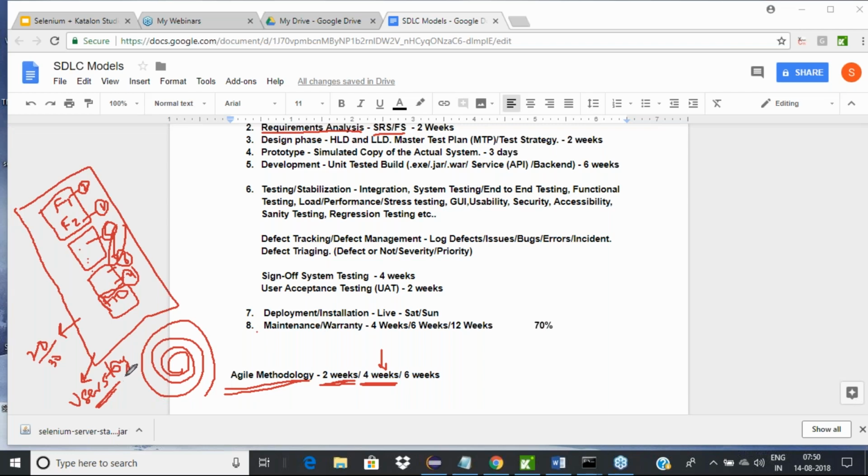And in Agile, everything happens through user stories. And typically there is a Scrum team of 7 members. Like there is a question Piyush is asking, how is Agile different from Waterfall? One is clearly duration. Duration from 3 months brought down to 3 weeks or 4 weeks or 2 weeks, right? That is the first point.